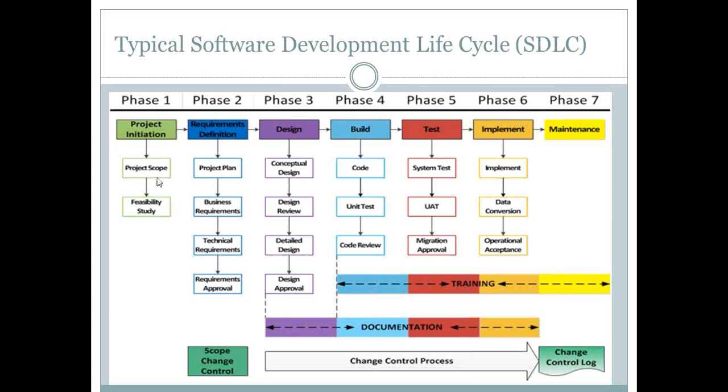So in phase one, you will identify the overall scope, then identify what could be the budget of the project, and then allocate the budgets and people. Then phase two is where you would plan for the detailed project. This planning would be the primary responsibility of a project manager. A project manager owns a complete end-to-end plan of how you are going to capture your requirements, how much time it would take, design, build, and who is going to be involved in that.